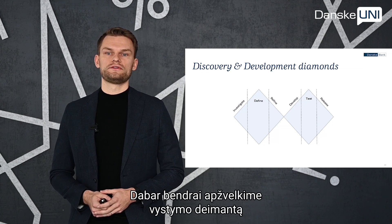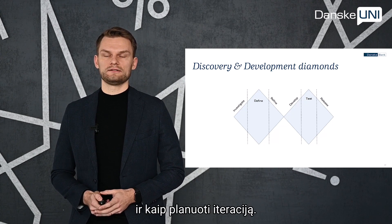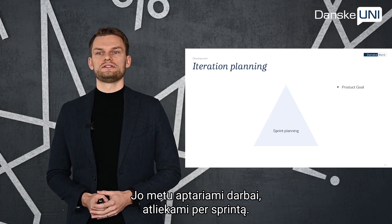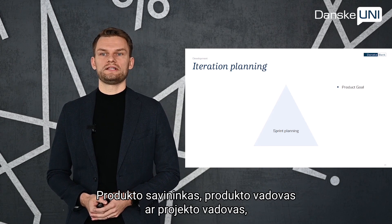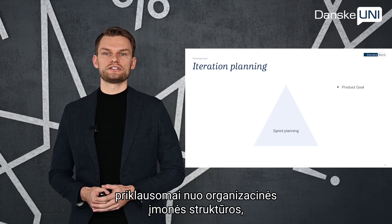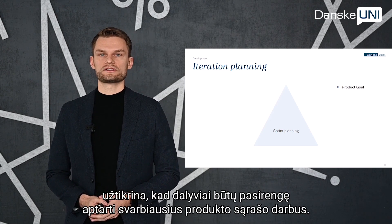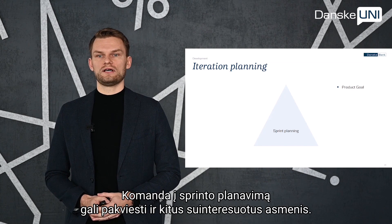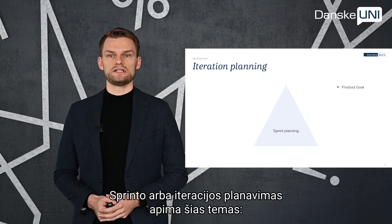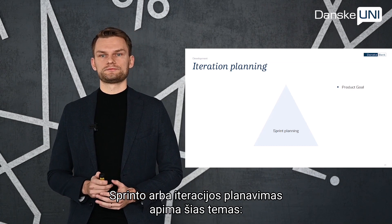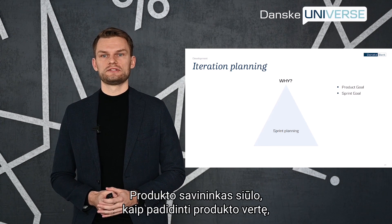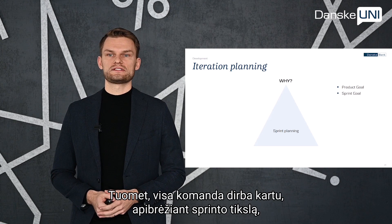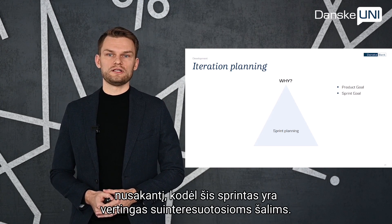Now let's take a high-level overview of the development diamond and how to do iteration planning. Iteration planning in Scrum is called sprint planning, and it is initiated by laying out the work to be performed for the sprint. The product owner, product manager, or project manager, depending on the organizational structure, ensures that attendees are well prepared to discuss the most important product backlog items and how they map to the product goal. The team may also invite other stakeholders to provide advice. Sprint planning addresses the following topics. Topic one: why is this sprint valuable? The product owner proposes how the product could increase its value and utility in the current sprint.